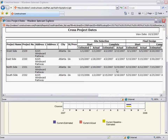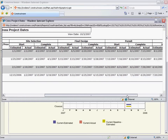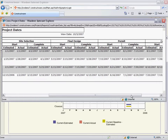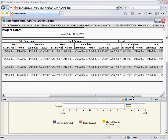An example of one of these reports is this Cross Project Dates report, which shows me for four different projects what my start and complete estimated and actual dates are for each milestone. This is just one of the many formats you can use to communicate this data out to your project team.